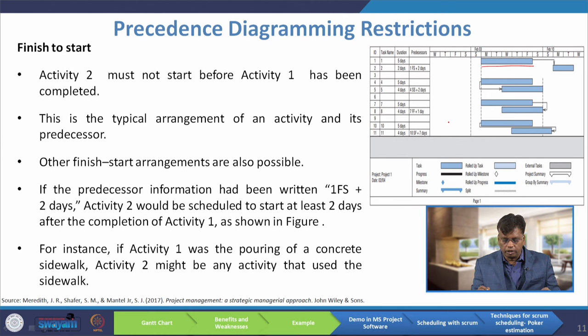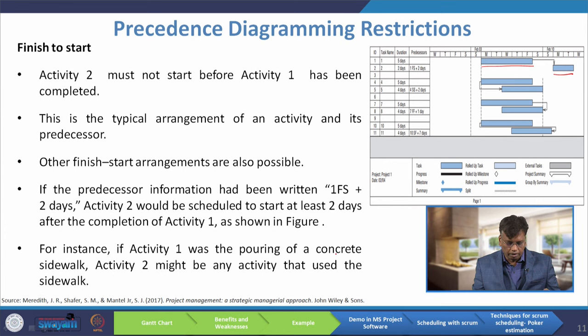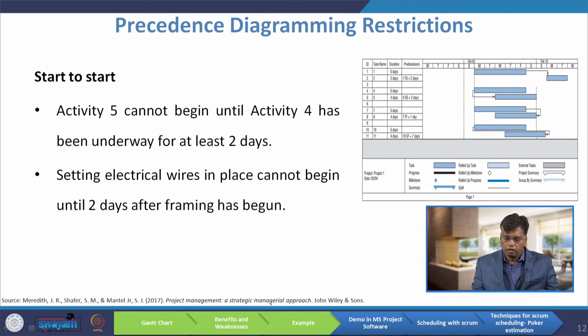Other finish-to-start arrangements are also possible. If the predecessor information is written as '1 FS + 2 days,' activity two would be scheduled to start at least two days after the completion of activity one. For instance, if activity one was the pouring of a concrete sidewalk, activity two might be any activity that uses the sidewalk, because there is time required for the concrete to set — that is why the two days.